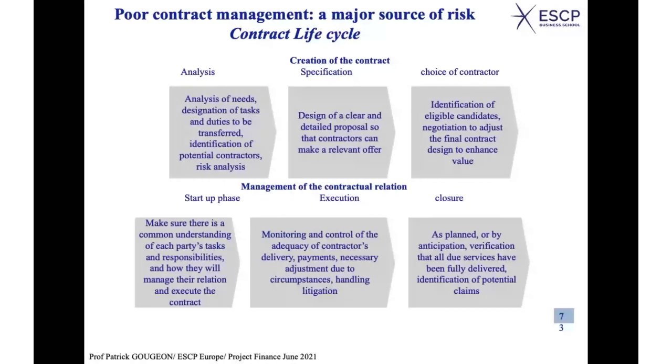You know, at the end of the contract, you may have some problems, some difficulties later on, if the provision of your equipment or service was not as it should have been. Okay, so if you have potential claims with different parties later on, you need to identify them, either to write a provision or to identify clearly the responsibility of the provider.